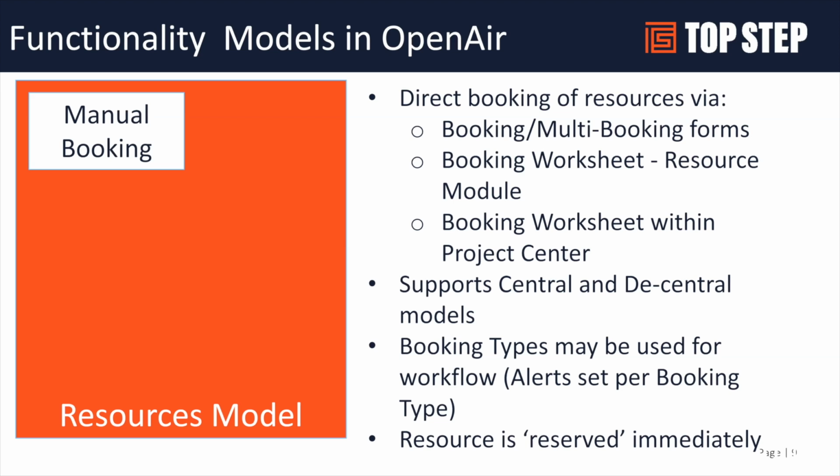The other thing about just creating a booking is that as soon as you hit save, that booking is immediately visible in reports. That resource is immediately reserved. So there's no delay. As folks are looking for available resources, your resource becomes immediately unavailable.